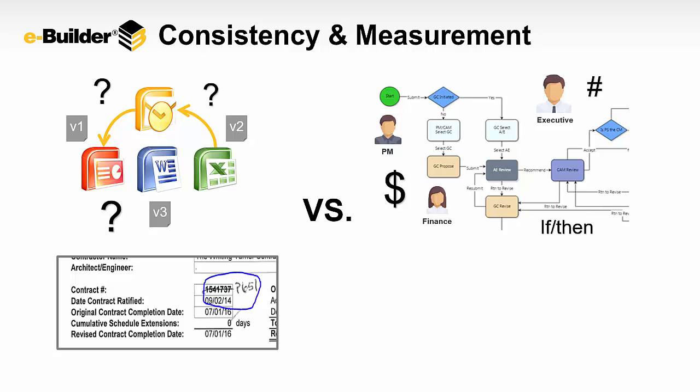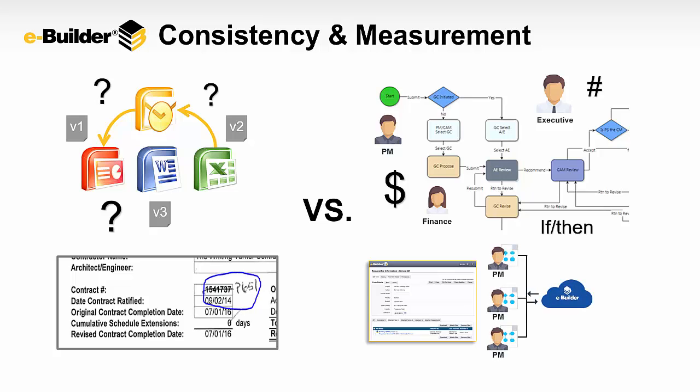things were taking from moving from one stage to another, and then actually tying this information to your costs and updating, especially if there's a payment invoice or if there's a change order request that actually matures into a change order. And so you ultimately want to be inputting things into forms rather than separate documents, so that way information and the data that's input there can consistently be done by each project manager and then automatically be routed into dashboards and reports that executives can review and make sure that they find issues before they become big problems.